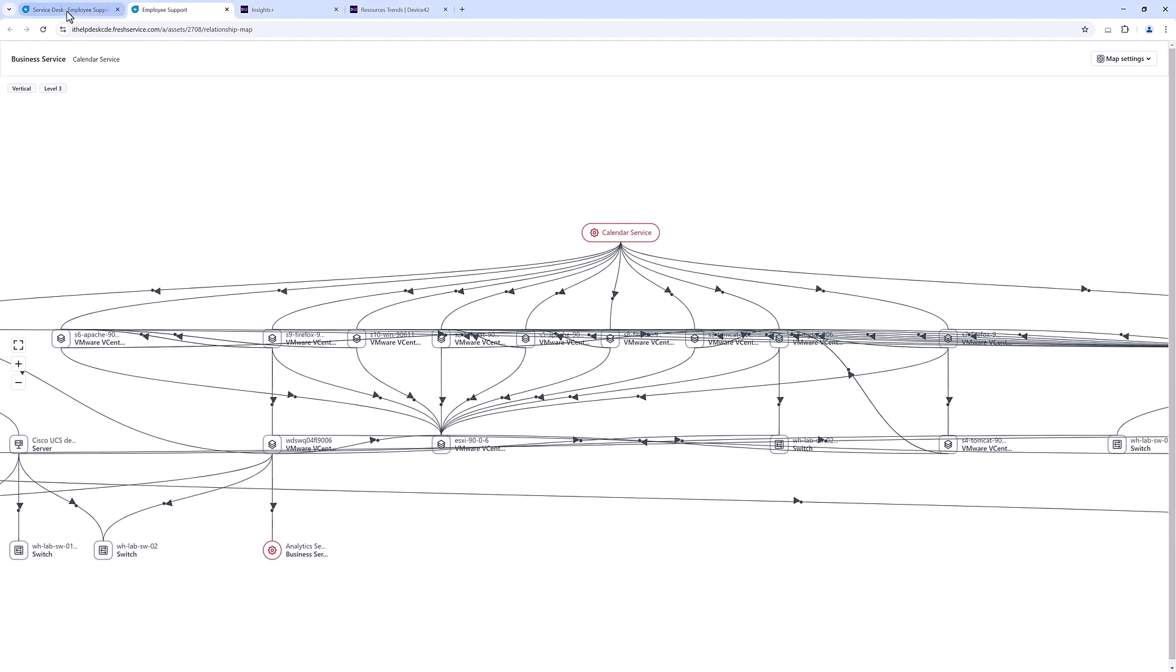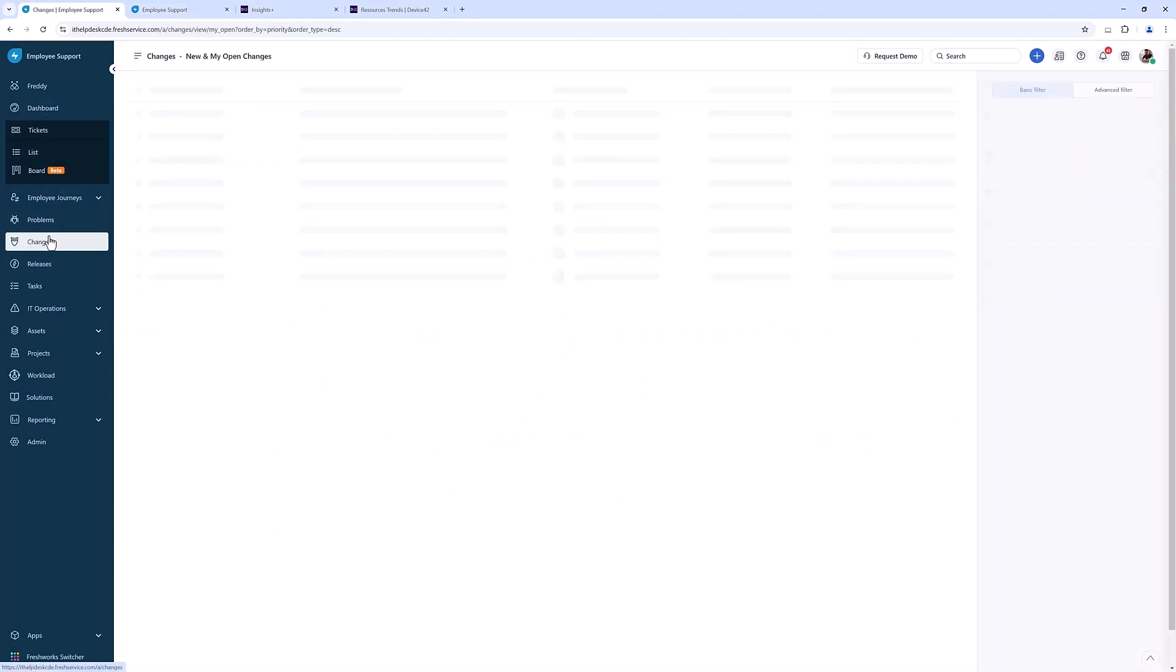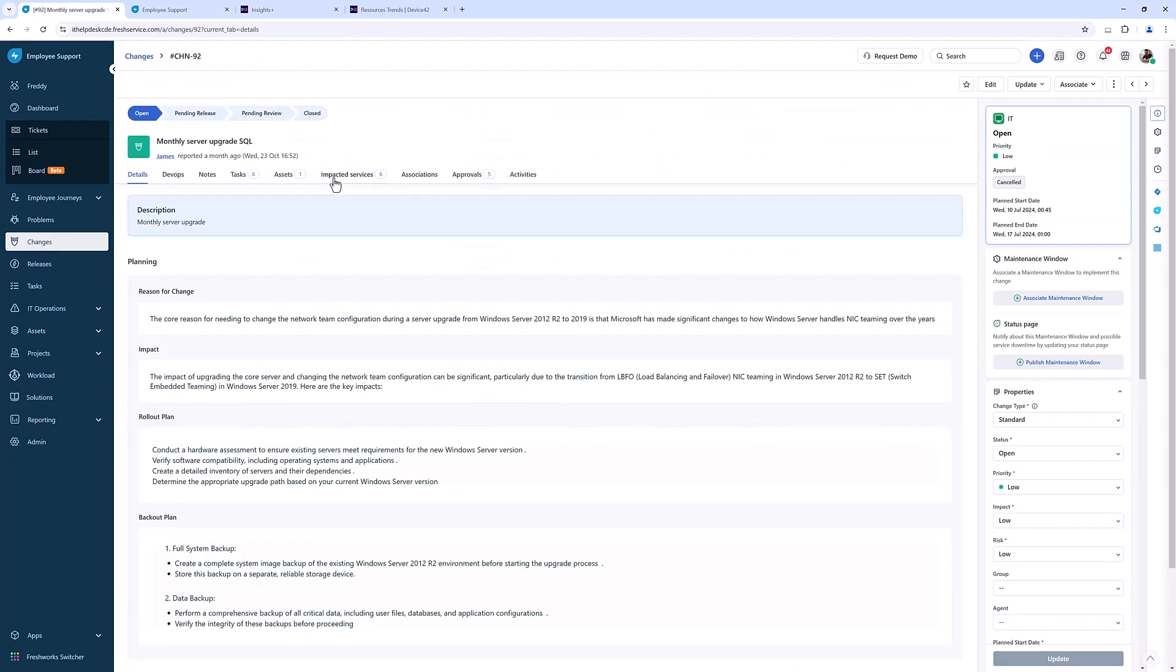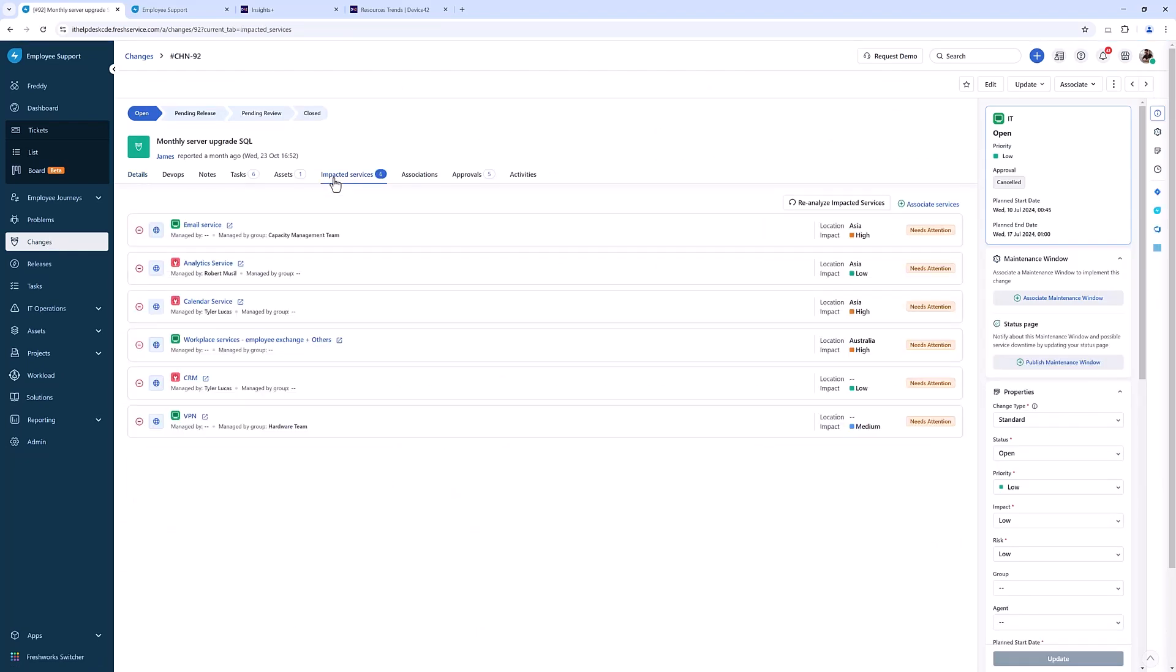It also helps you de-risk some of those change controls. Now if I wanted to look at a change control on that same s1 box, I can look at the impacted services, and now I can see that this is quite an important box. It's not just upgrading a Linux machine—this is potentially taking down six mission-critical services.